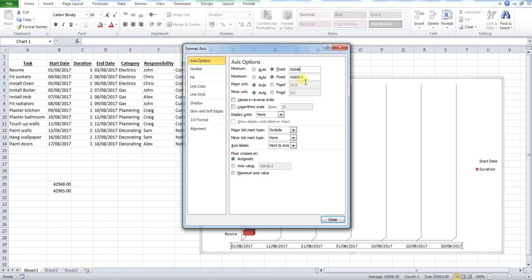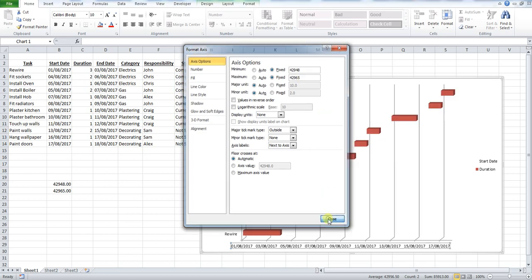We're now able to edit the second number to the second number we generated, 42965, and then press close.